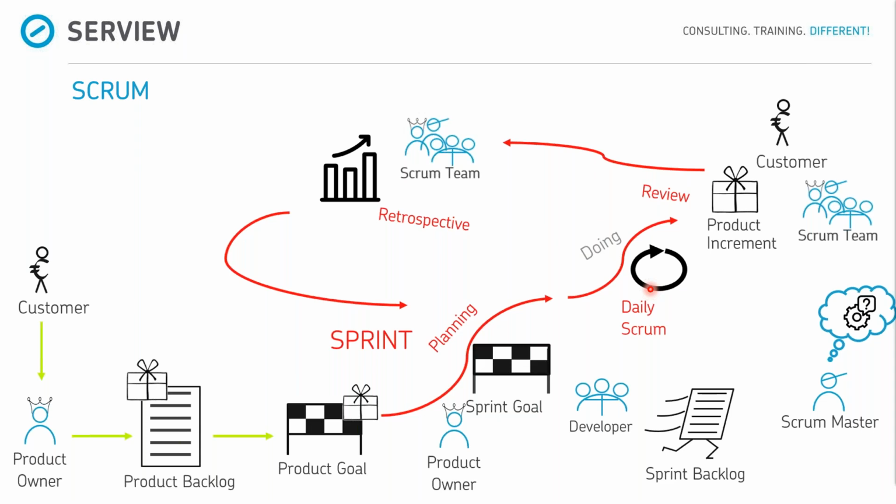And through just-in-time planning, it is easier to react to changes because you can swap or trade requirements, because we start a new plan in every sprint. We don't plan the whole development. We only plan in iterative moments. And one more pro for Scrum is that through the daily exchange, you have a quick recognition of impediments. So you can react very fast on risks, for example.